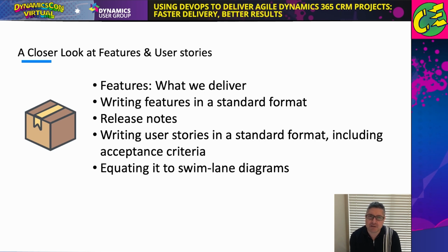We write features in a standard way where we always begin them with the words, "enables you to ..." Or we'll write them and say, "you can now ..." For example, a feature might be, you can now spell check in Swahili. That is a feature. That is not a requirement, it's a feature that involves a number of user stories. The description that's found against a feature is what forms the release notes.